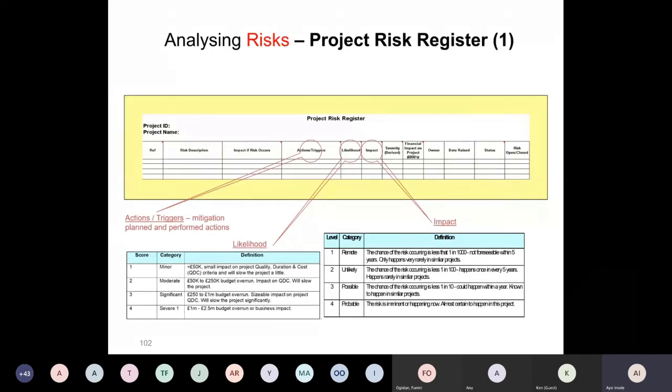Now, as a PMO person, guys, your job is not to explain what the impact is if it should occur. No, your job is to document. Your job is to speak to the project manager and make sure that everything is documented. We're saying that there's a risk of 4 of the laptops being on Windows 7 and one on Windows 10, thereby not accepting Office 365. Fine. As a PMO person, guys, I'm not a technical person. I don't know the impact. What is the impact if it should occur? The impact is there will be delay.